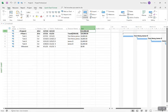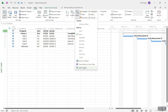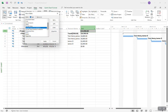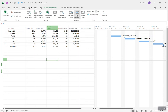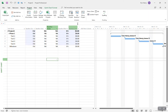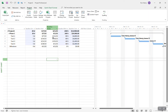Let's take a look at the baseline table under View > Tables. When you set the baseline, all it does is copy the start, duration, finish, work, and cost data into the baseline fields — baseline start, baseline finish, baseline work, baseline cost. If you clear the baseline, those values go back to zero. Baseline zero is what counts — that's where all of our variance will come into play. I'll talk more about variance once we've updated the project.